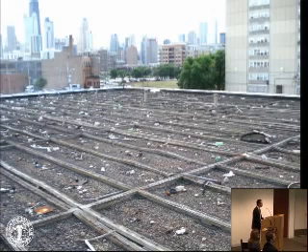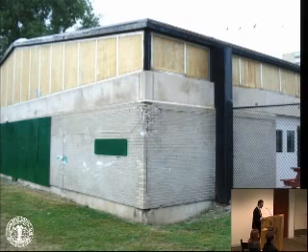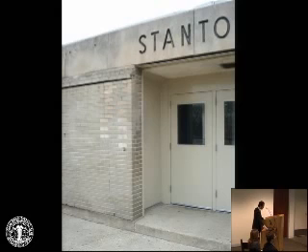27th Ward. This is a shot of the existing roof. The building is aging. It needs significant work. The work includes replacement of roofs, repair and replacement of portions of the exterior masonry and concrete, the deteriorated steel lintels and shelf angles, repairs to the interior masonry at the swimming pool and the gym, repair and repainting of exterior metal elements, swimming pool room windows, and interior plaster repairs needed for water leaks.